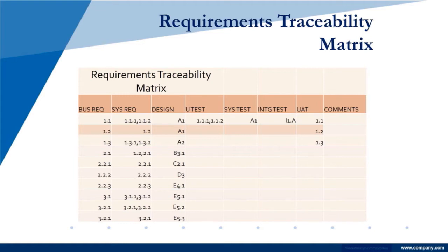The point is, as much as you can get and link together, that means that when I come back at the end of this project and go down my UAT list and ask, did this pass UAT? And you're in charge of UAT and you say, case 1.1, 1.2, 1.3 all passed, I should be able to know that the three requirements, 1.1, 1.2, 1.3, also were met.